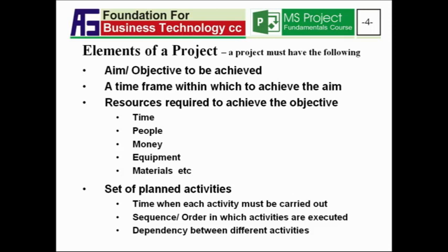You also find other activities that can be performed at the same time or simultaneously. When we are constructing a building, there is the brickwork as one activity, and then there is the electrical fittings as a separate activity. But the two can happen at the same time, because as we are putting up the walls, we need to put the electrical conduits within the walls themselves. So we can schedule these two activities to happen at the same time.